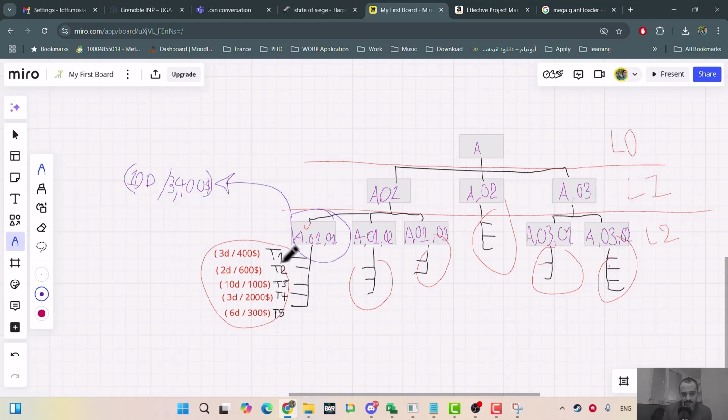For each task you now have the estimation of the cost and of the duration. Maybe not for the duration, because this task may link to other tasks from a different work package, and because of that the total duration changes. But if we assume that these tasks are separate, not even linked to each other, then the duration is 10 days.